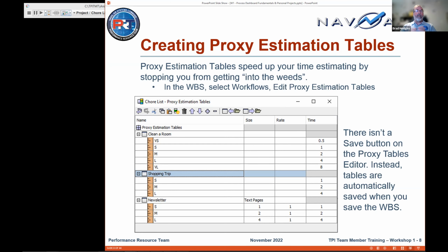To stop that, what we do is we have these proxy tables in the launch level, where the times in this case, or the sizes, are well separated from each other. So you have a doubling and halving going from big to small, and doubling from small to big. And so when people look at it, they go, oh, it's one or the other. That's too big. That's closer.